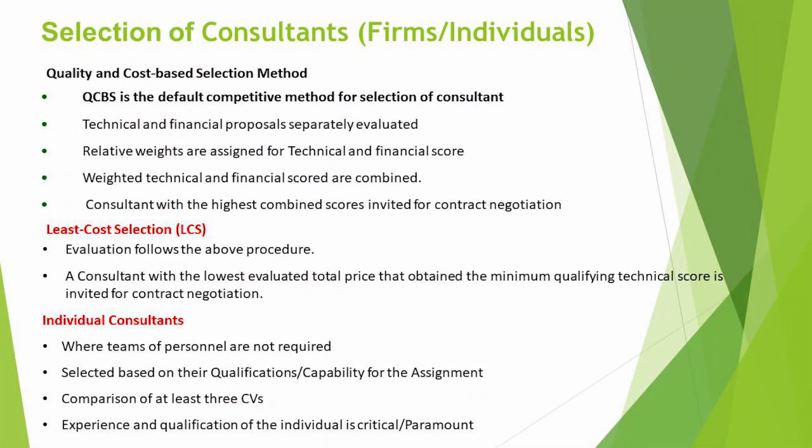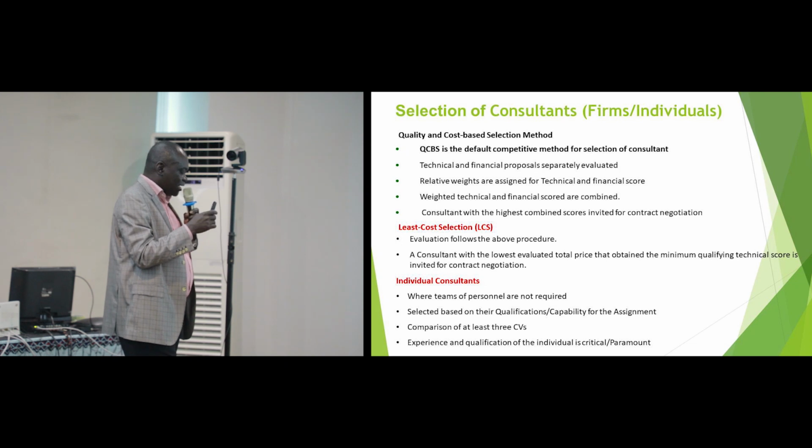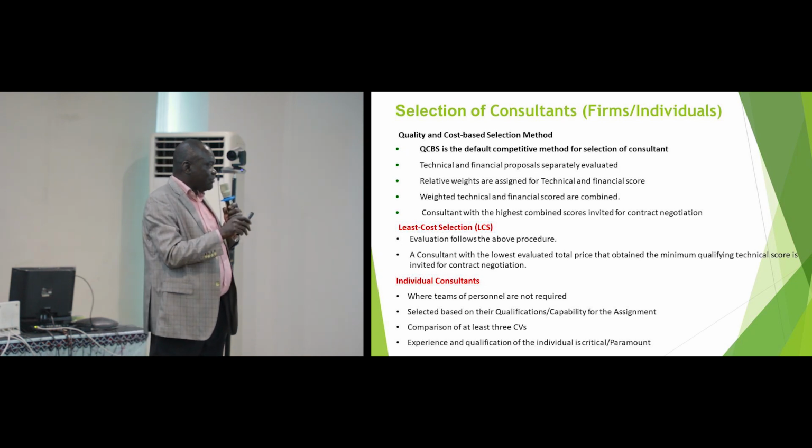Now, the procurement planning is linked to the project implementation schedule and of course involves planning for procurement of works, goods, consulting services, and non-consulting services, because that is where TAAT and TSF will basically be handling. Goods, not so much. Consulting services, yes. Non-consulting services, maybe half of the budget. But you need to do a plan for that. You don't have anything to do with works, with major contracts, the engineering and procurement process. But mainly goods and consulting services.